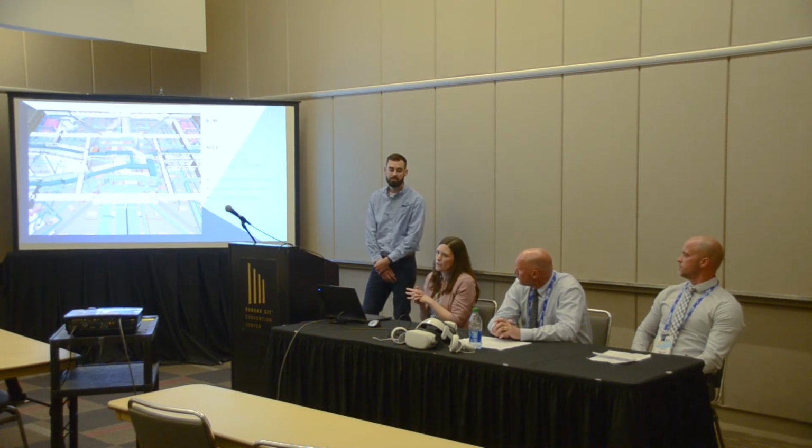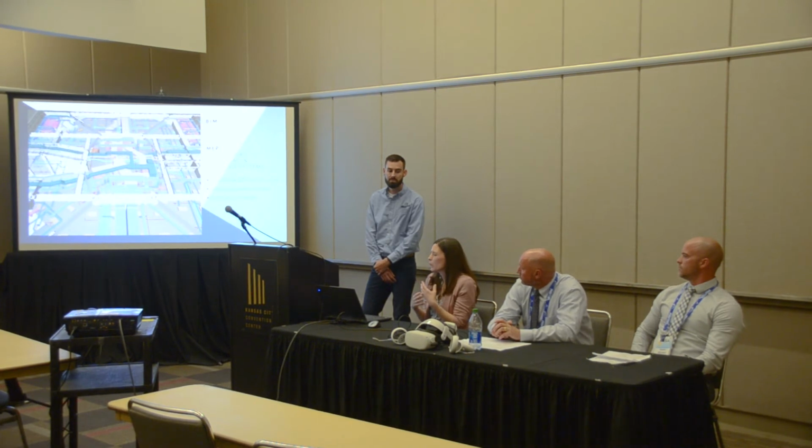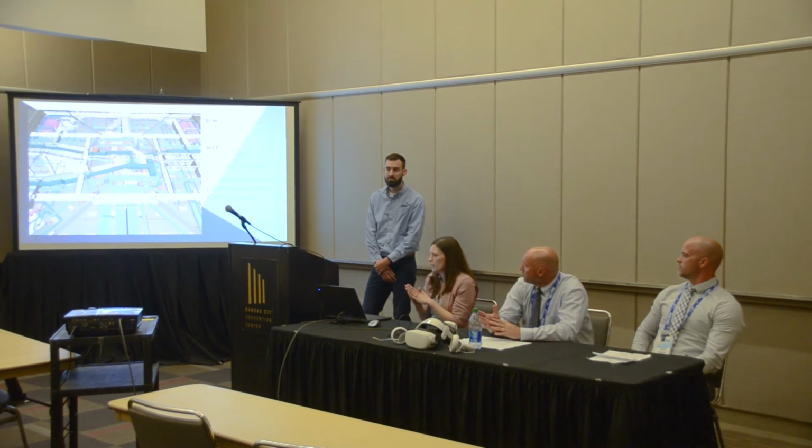It really helps us from storing a lot of stuff on site that we don't need. Gets our just-in-time deliveries figured out by the piece mark, and it just makes getting things up into the air go a lot more smoothly.